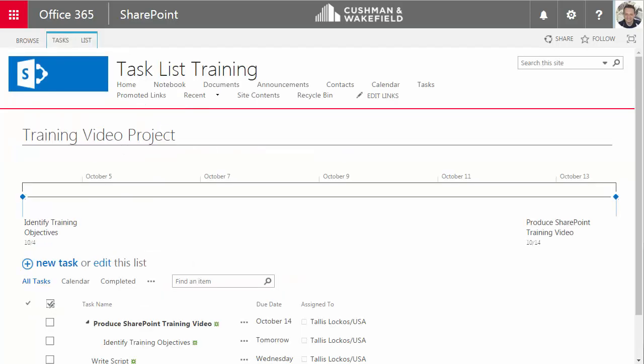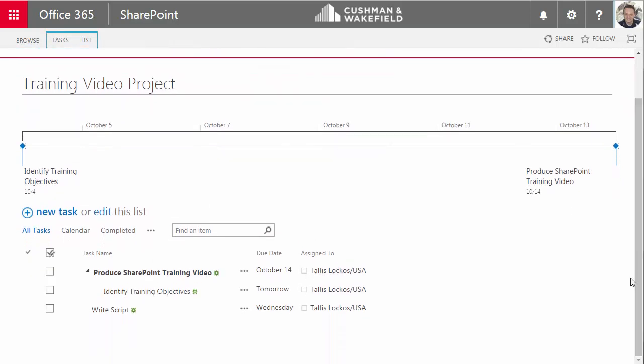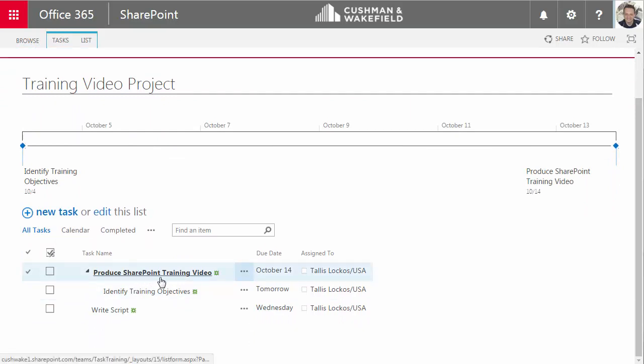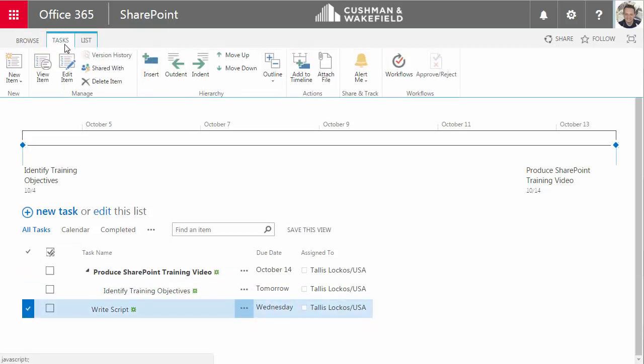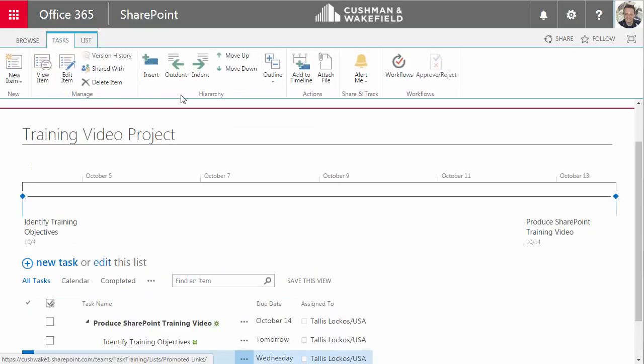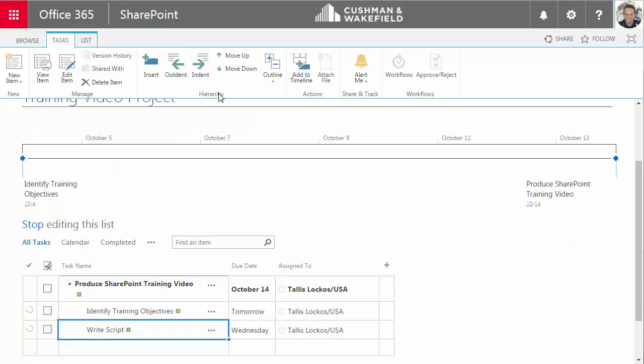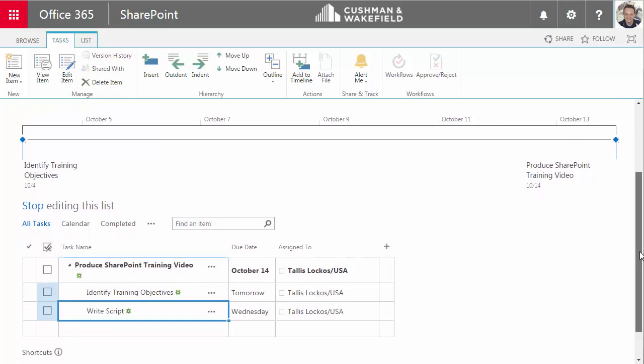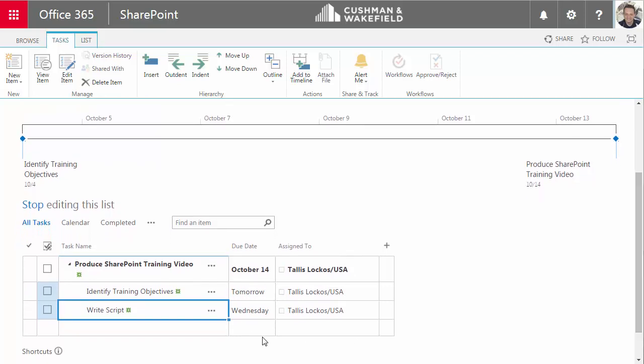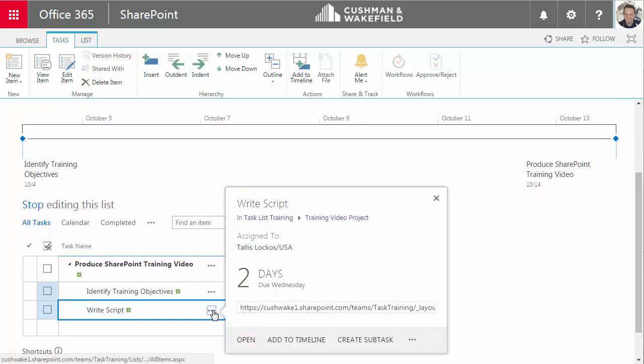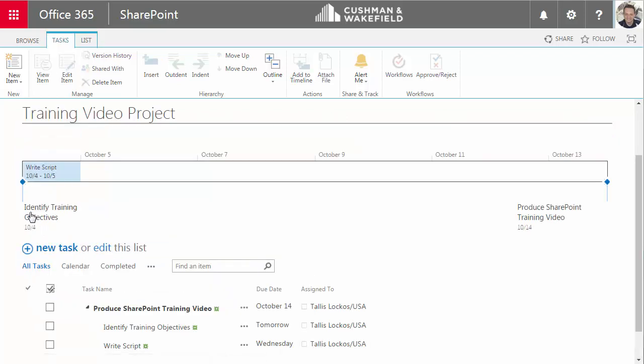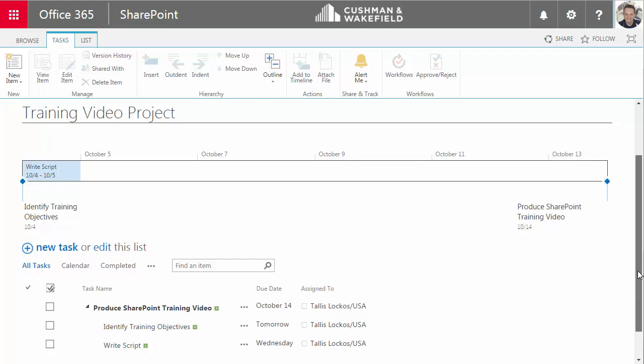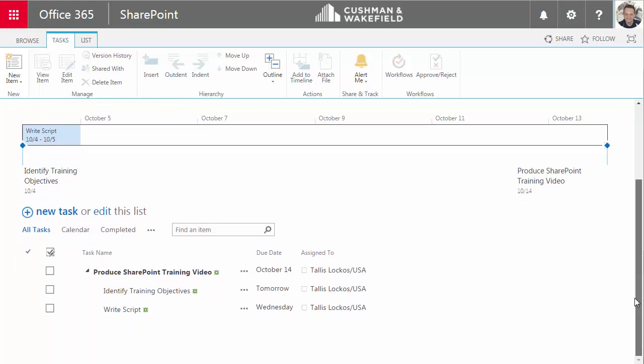Okay, a couple of things here. I have this Write Script item, but I want it to be a subtask of the Produce Training video. To do that, just indent it. Put a checkmark in front of it, go to the Tasks tab and indent. SharePoint switches into edit mode and indent that task. You know, while I'm here, I can add it to the timeline. Then I'll click Stop Editing. And since I have a start date populated for this task, I can see that it has shown up on my timeline with a blue bar indicating the period of time for this task. Now, I can also go back and enter start dates for the other tasks. I'll show you how to do that in a moment.